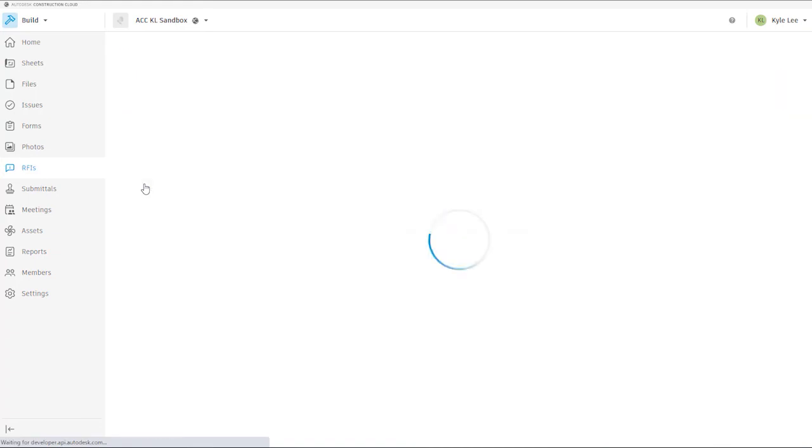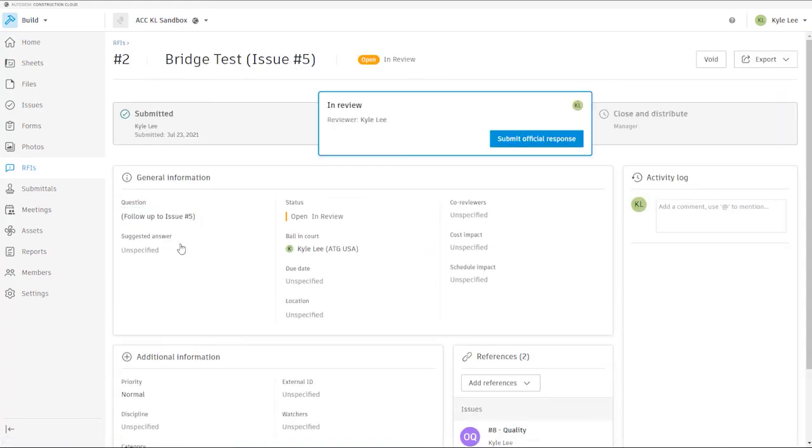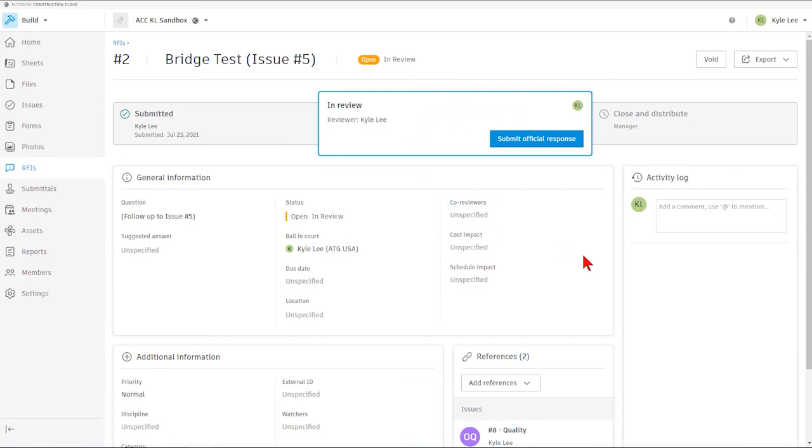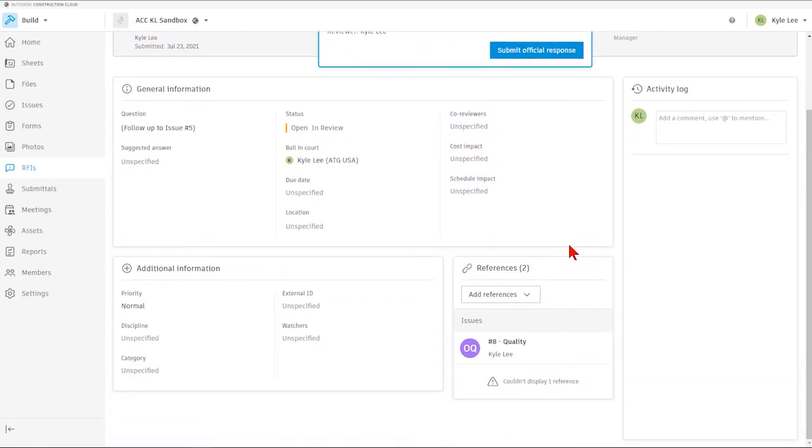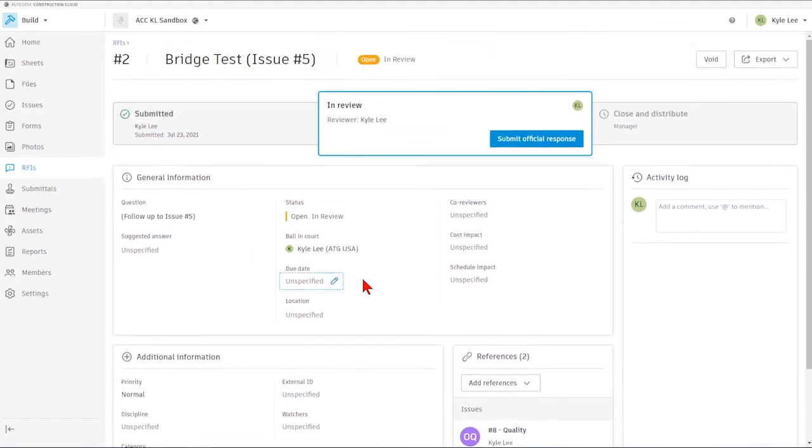So as we jump into our next RFI, we can see that this RFI has been submitted and it's currently in review. So this would need to be reviewed by myself. And I can go in and review the RFI, potentially add any additional information, and then submit the official response.